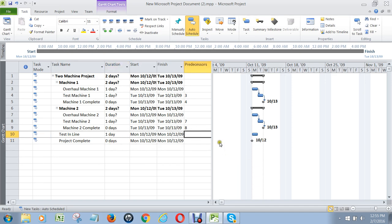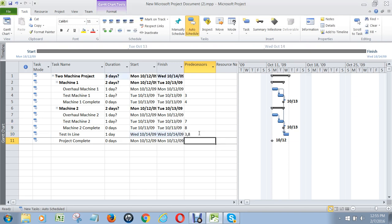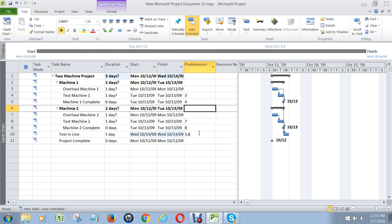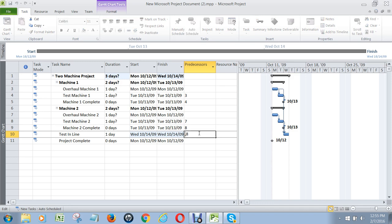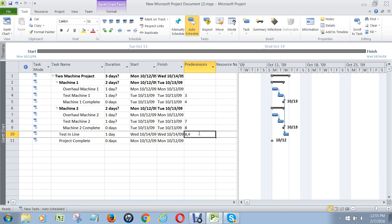We can't test in line, however, until we've tested machine 1, which means task four has to be done, and we've tested machine 2, which means task eight right here is also completed. So we put a four and an eight here. Notice how we didn't put the milestones as predecessors for testing in line — we didn't put machine 1 complete, which is task five, as the predecessor. Task four, test machine 1, is the predecessor to testing in line.